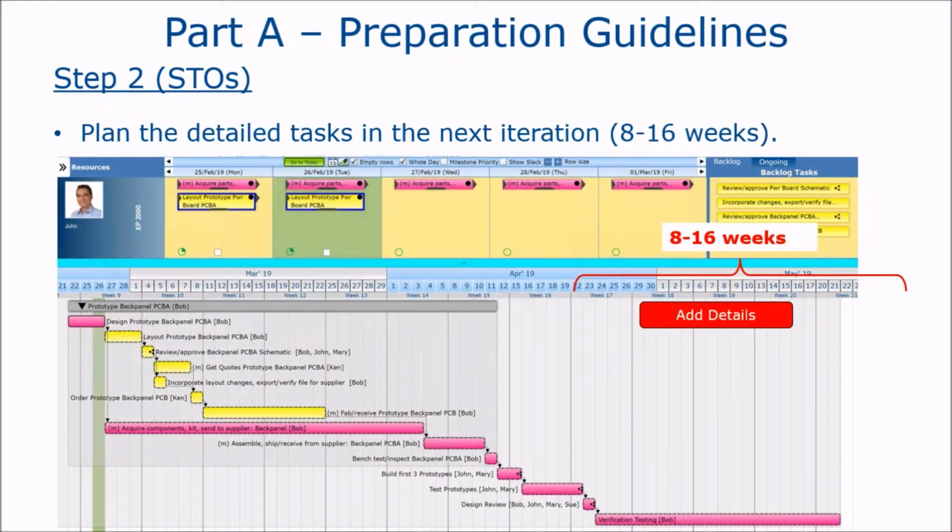And so we might spend a little bit of time during this preparation phase looking a little farther out, start giving it some thought, start laying out the detailed work that needs to be done. And with rolling wave planning, we'll be revisiting this every week at the most, maybe every other week. So we'll be sure to keep the plans up to date, fresh, and accurate. And that's going to help us to execute in a much more smooth fashion, learn earlier, reduce the things that cause delays unnecessarily because we learn about them later, to a minimum, things like that.